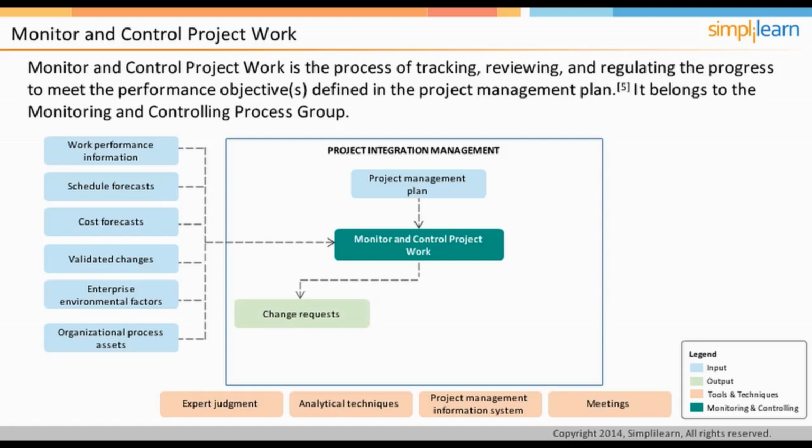One of the outputs of this process area is change requests. Change requests could be in the nature of corrective and preventive actions or defect repair. If the performance measurement baselines are not being met, this process ensures that project manager takes appropriate corrective and preventive action to get close to the performance measurement baselines.